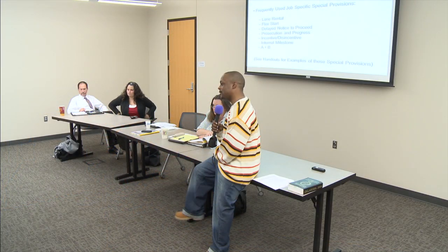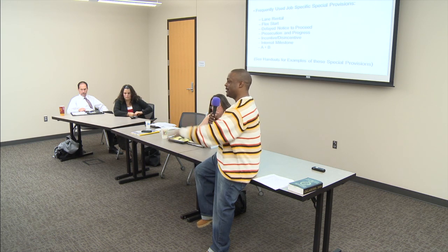I expected questions here. This A plus B gets complicated. You've got 240 calendar days to complete the whole job, that's final completion. And 210 for substantial completion. You call it B? You're just basically giving it a term. It's not that your substantial completion is the incentive date. Your substantial completion is the substantial completion for the project period, which is associated with the 210.